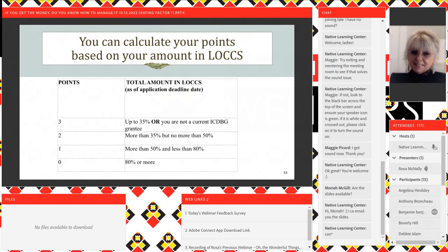Well, now I can't do my environmental because I've got to do soil borings in order to do that. Well, our ground is still frozen in April. So now I've got 6 months or so that I'm sitting with that money in the bank to HUD. It looks like, well, are they going to start this project or not? Of course, when I give my ACER reports, I'm going to explain what's going on. But even though I've got 2 active ICDBGs and a third one that I'm not being able to manage right now,